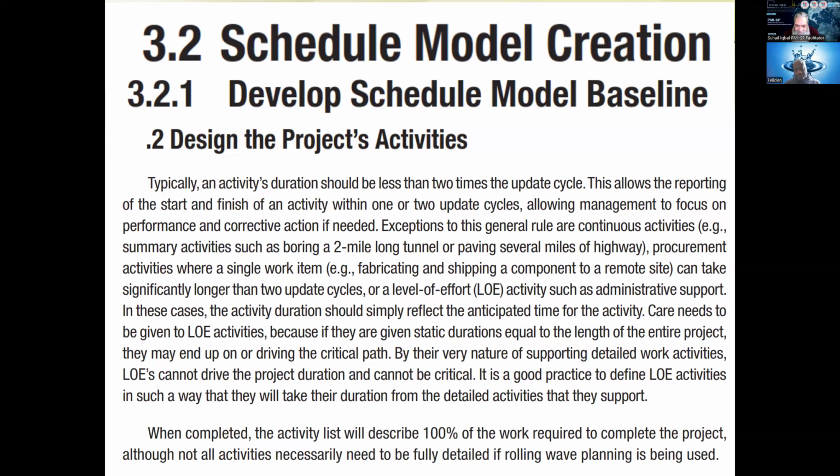Yes, sir. It is a good practice to define LOE activities in such a way that they take their duration from the detailed activities that they support. So rather than attaching it to the whole project, we should attach it to ongoing activities. We say the level of effort for this 1 week's job which has been done, let us calculate the load according to that for the LOE activity, rather than comparing it with the whole critical path.